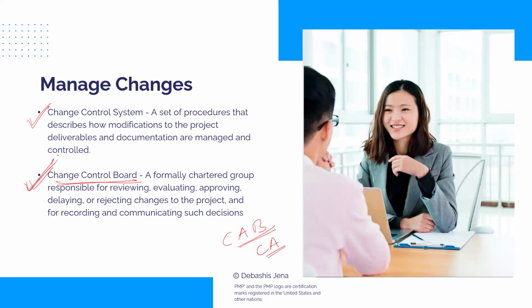So the change control board is a group of people who have been designated as the CCB and empowered to decide changes. Their job is just one thing in a project. They would simply approve or reject changes, right? This board would be meeting once in a fortnight and conduct change control meetings, during which they'll take up all changes raised in the last fortnight, and they will take a call on these, basis all information that is fed by the project manager. They're the decision maker, all groundwork PM would do.